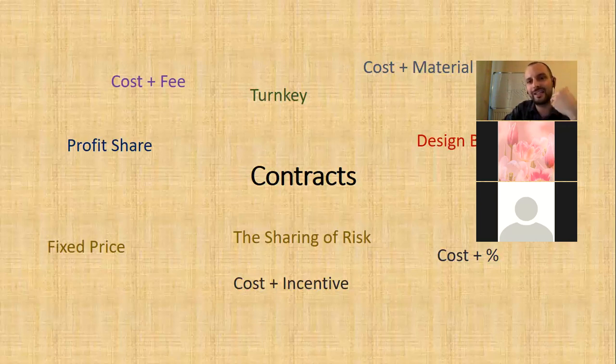If you start saying, I'm going to charge you a penalty of 5% for every week you are late, you start getting into legal problems because you need to actually justify that your penalty is in keeping with the cost that you're incurring and other things. But generally, I mean, it's the same with anything. People generally react better with carrots than they do with sticks.